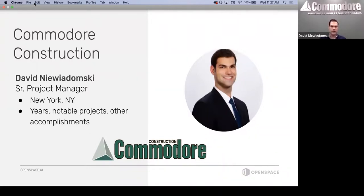We spent probably a good 3 hours, me and my foreman, laying it out, figuring out where we can drop it and how much space that's going to get. Then I did it again with the LiDAR scanner and it took me an hour. So from spending 6 total hours with 2 people to about an hour with the LiDAR scanner, it's a really nice feature. The foreman just scans it, I can do everything else from the office, and then send that up to our modelers and we're done.